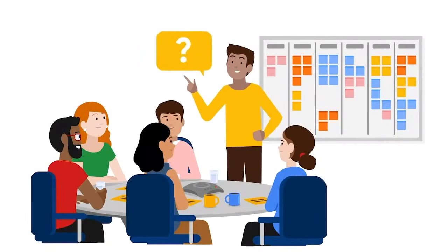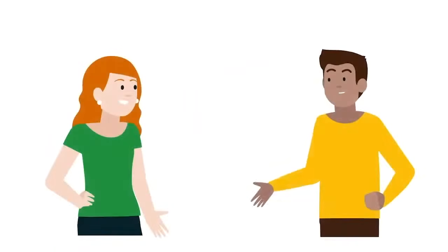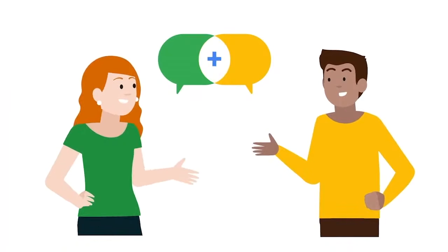During the retrospective for the last sprint, a team member says, "I need to implement a certain feature, but I don't have much experience building that particular feature." Someone else on the team is an expert on that feature, so you decide to pair them up so they can work on building the feature together during the next sprint. You've just blended XP and Scrum. XP provides the basis for working in pairs from pair programming, and retrospectives are a key component of Scrum.